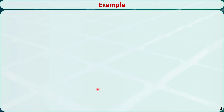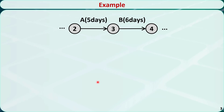Let's check some examples. This is a portion of a project network. Activity A starts at node 2 and ends at node 3; it lasts for 5 days. Activity B starts at node 3 and ends at node 4; it lasts for 6 days. Activity A must be completed before activity B can begin. Activity A is called the predecessor of activity B, and activity B is called the successor of activity A.